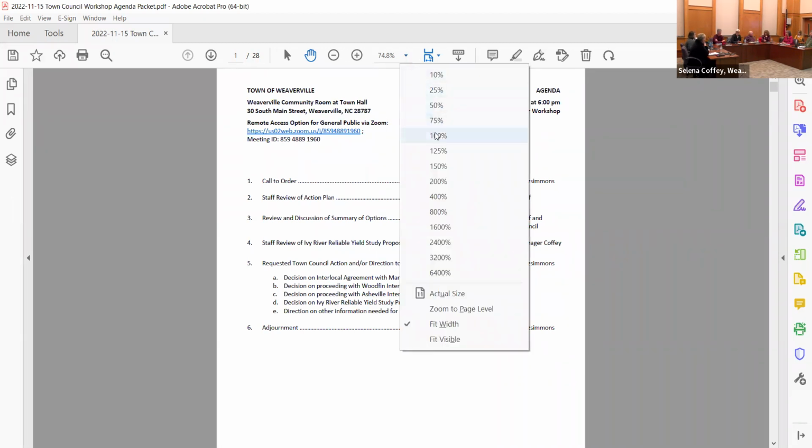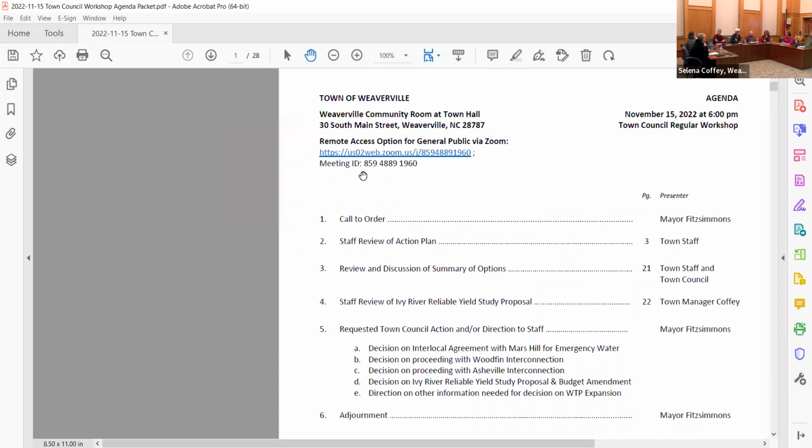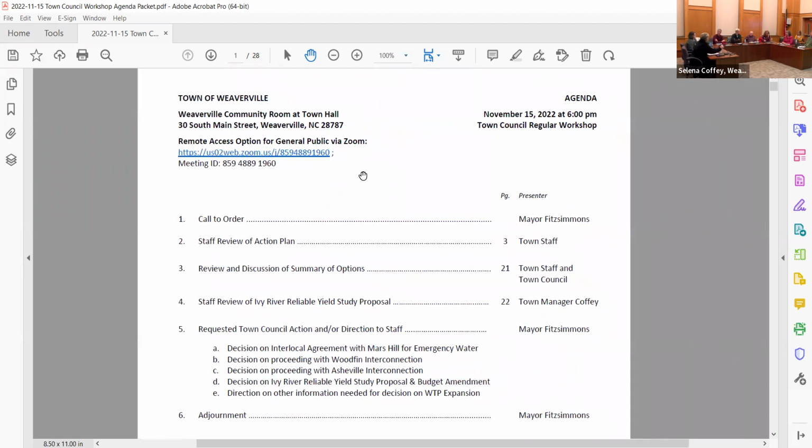The study should take 5 weeks whenever, and presumably they can get started pretty soon. 5 weeks, they will have the information to us in 5 weeks. And then I think, am I thinking 2 weeks probably? We've got like 2 weeks to review and see if there's anything missing, if we feel like there's data that they didn't collect or whatever, and submit that back to them. And then my assumption is they could make a quick turnaround and give us the final report soon thereafter.